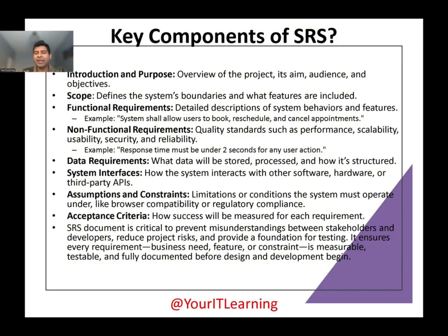Think about if at any time we don't have clear directions, and if we create something wrong, then we have to recreate it. A lot of infrastructure is needed. A lot of resources are needed. Every agile team has at least 5 to 7 people, like Scrum Master, 3 or 4 developers, BA, product owner. All of them have to sit down again and redefine the requirements. The developer has to develop it, the QA tester has to test it, and so it will take another sprint.